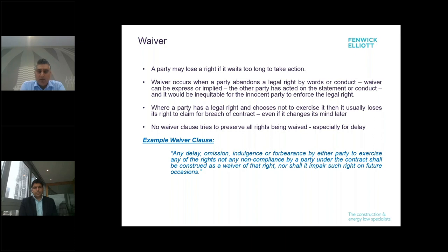So where a party has a legal right and chooses not to exercise it, it's prevented from going back and trying at a later date to enforce that right, and therefore it loses its claim to breach of contract, and ultimately its claim for any damages flowing from that. What a waiver clause is trying to do is preserve that right, in particular in relation to delay. It's saying that even though the party has delayed in enforcing its right, it's not necessarily waiving that right. That's actually quite an important right for a party, especially if they're delaying in enforcing. So that was a very quick run through, and I will now hand you over to Ed.